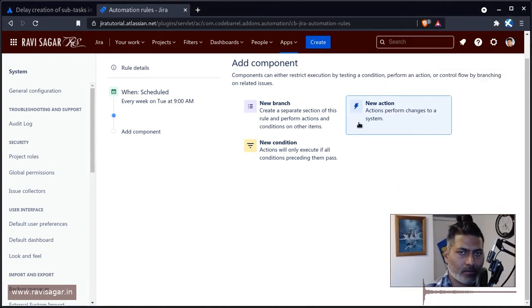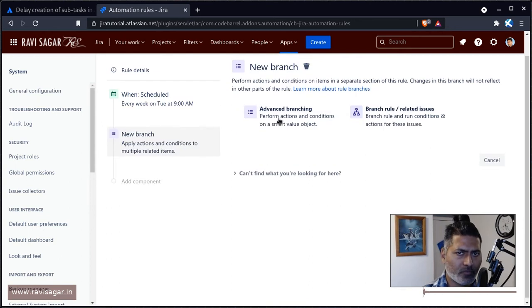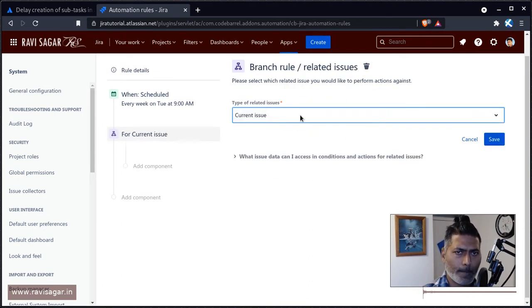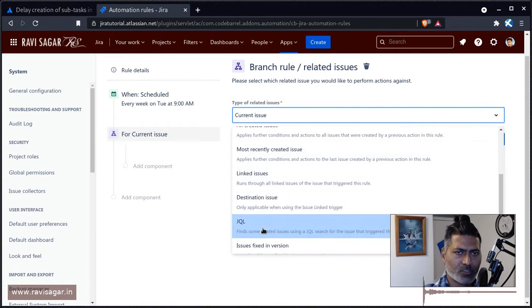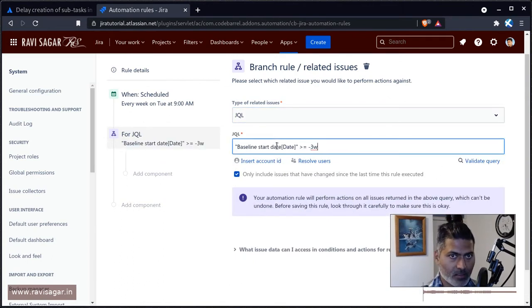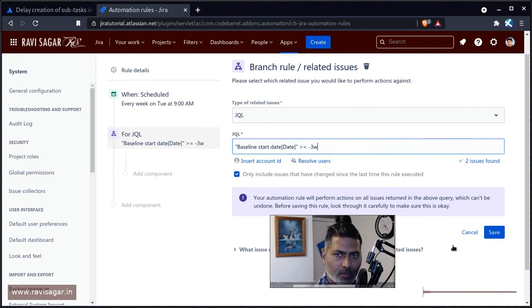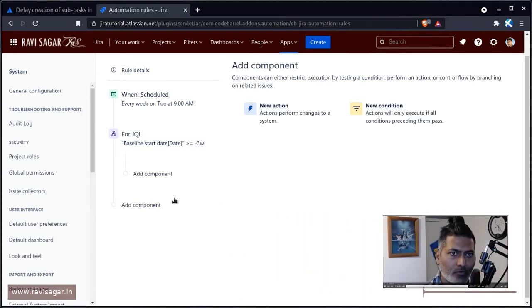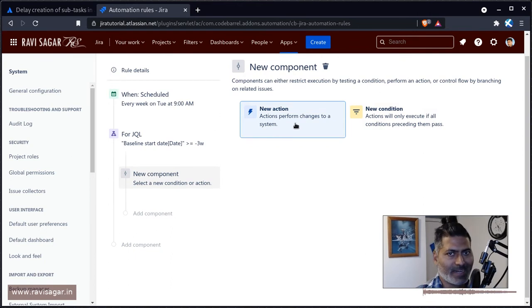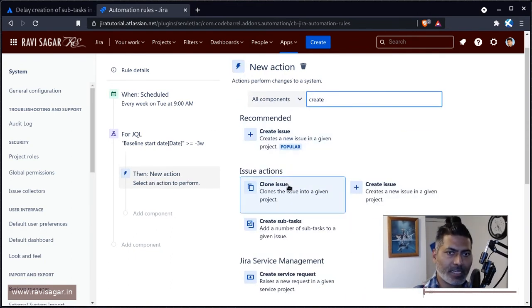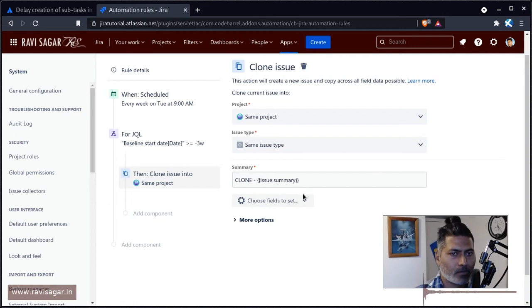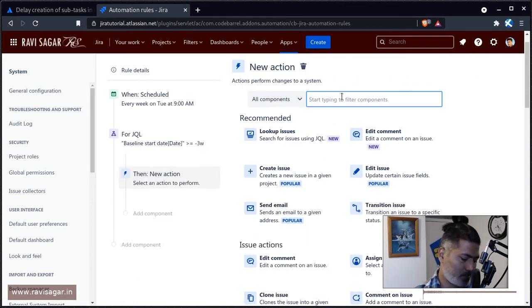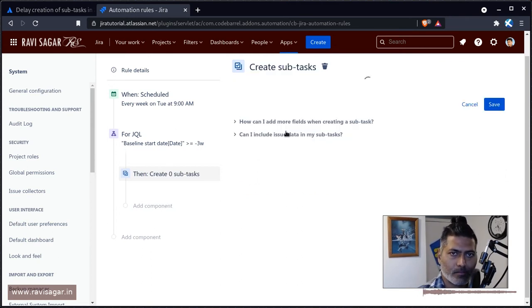What we'll do is create a branch rule and use a JQL. Here we can type in the JQL that we just wrote. What will happen now - in this particular case, we want to do something, and that something can be, let's say, create a subtask.